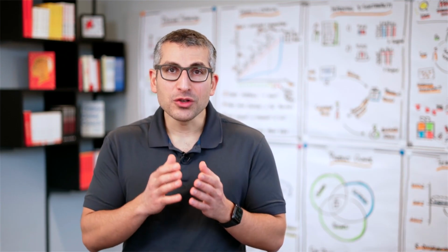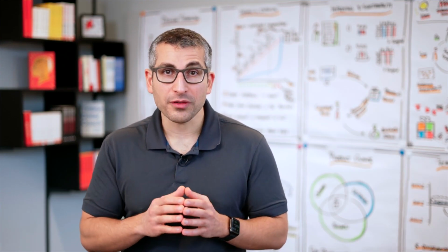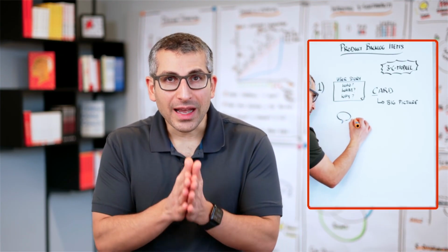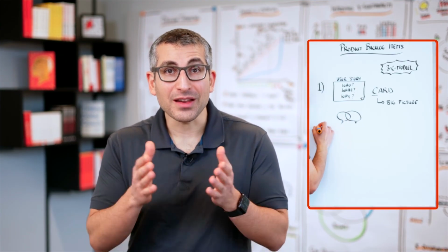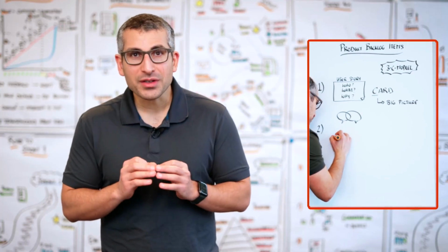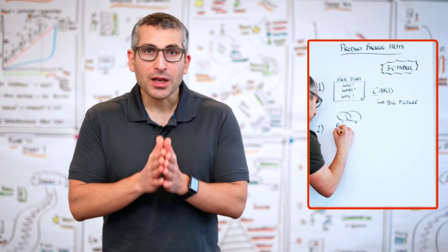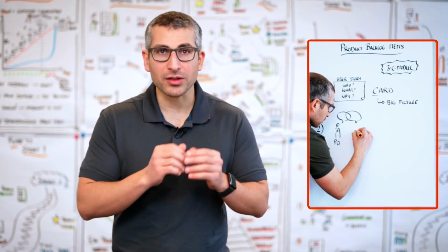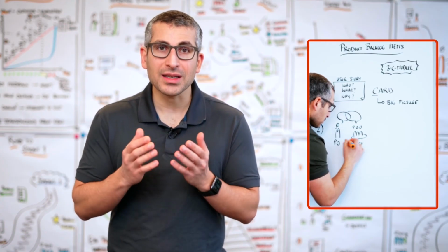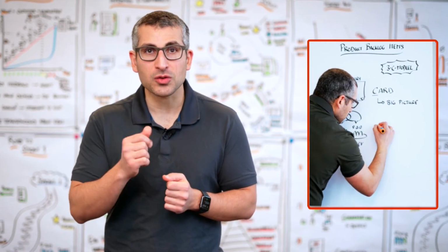Now, once we have that user story, we don't throw it over the fence. The user story has 2 pieces. The user, which is every user story is user-centric, and the story, which means that it needs to be told. And every user story, based on the inventors, is a placeholder for a conversation. And that conversation is our second step. Usually, it happens between a product owner and the developers. From time to time, you can engage a key stakeholder in that conversation as well.